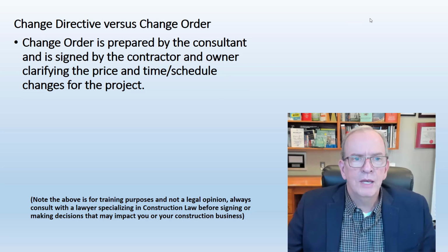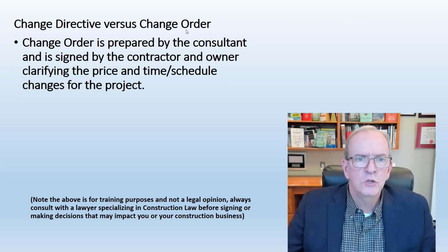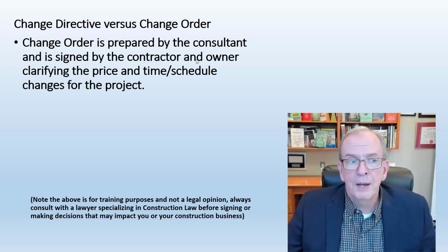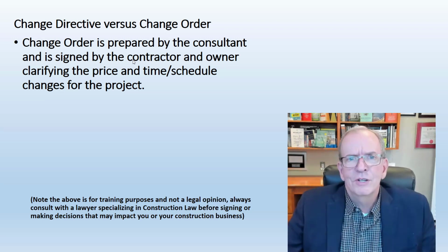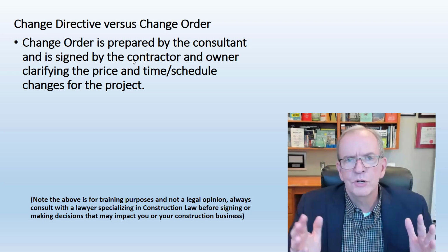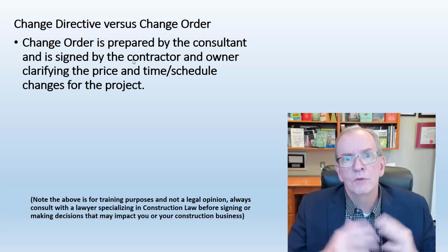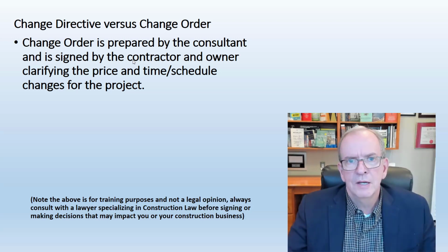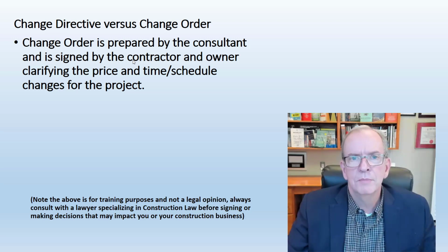Now, the other thing we can think of, as I've already mentioned, is change directive versus a change order. A change order is prepared by the consultant and signed by the contractor and owner, clarifying the price and time schedule changes for the project. So that's really good when you have a signed change order. Also, a claim, which I didn't mention, is an unresolved change. So when you hear that term come into play, a claim just means that it hasn't been resolved as a change or a change order.